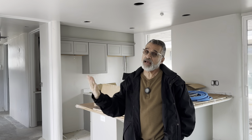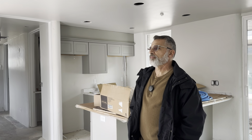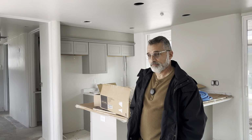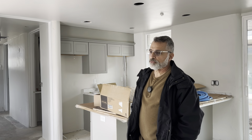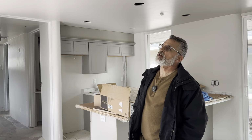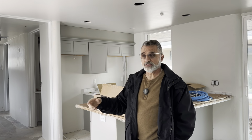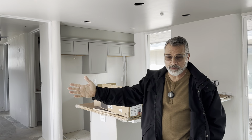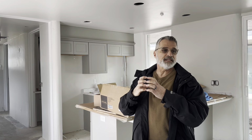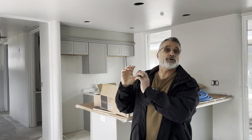If you were to ballpark it, what's the cost for a typical lumber frame home versus the WUI lumber frame home? On the average home, and I'm guessing here, it's probably in about the $20,000 to $25,000 difference range. One of the things that happened as we were doing a bunch of the rebuilds, there were many people that had insurance and we were helping them rebuild. One of the things the insurance companies needed to know is not only how much does it cost to rebuild, but how much are the code upgrades?